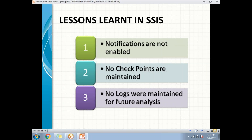If I enable notifications for all steps — either success or failure — for each and every important task, then it is very easy to determine success or failure and where exactly it failed. As a part of the lessons learned, we need to enable notifications in future SSIS projects.